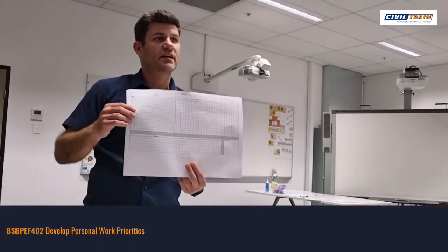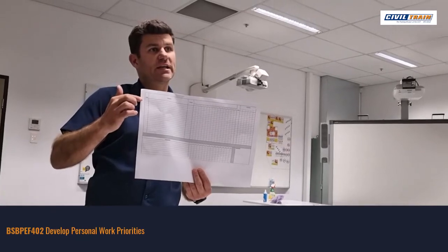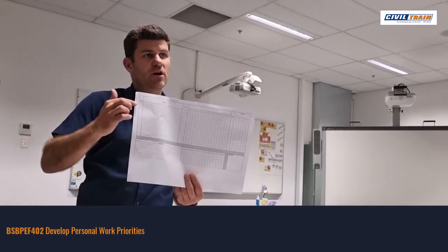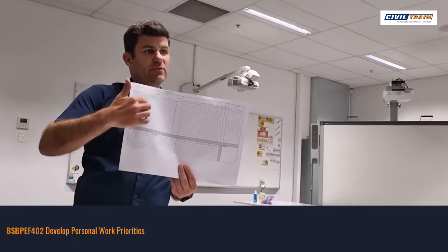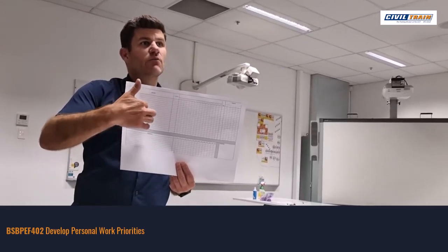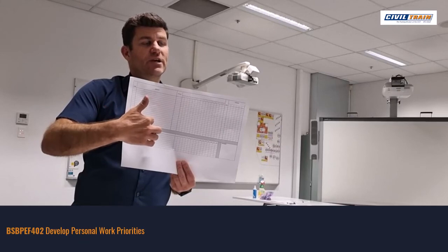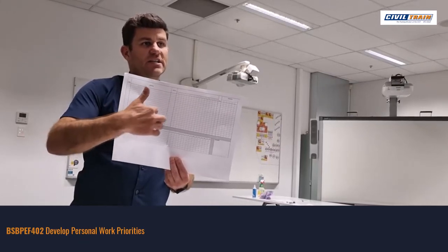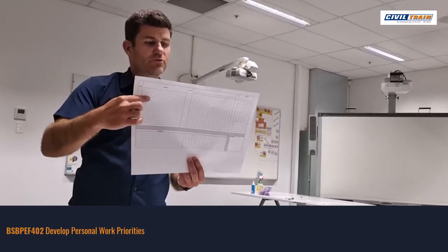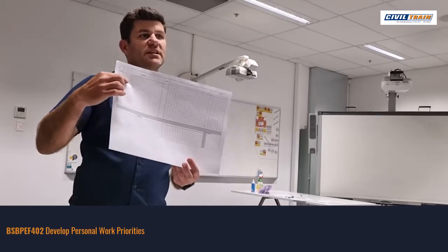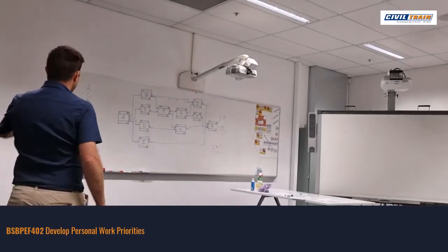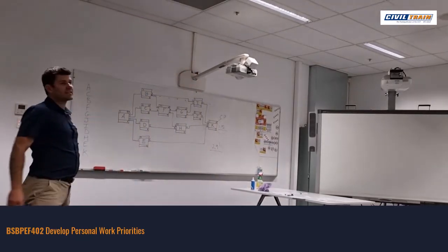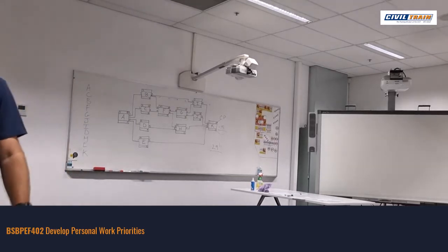The cascading number sequence. Yep. So we're going to put on the left hand side, in the can, number 1 to 11, and then we're going to put the corresponding activity, which is a letter, next to that new cascading number. The next box across, I believe we put in the duration, and then once we get to that point, I'll explain the next steps of colouring in the squares. But as you can see, we've got that new cascading sequence calculated using the critical path method.